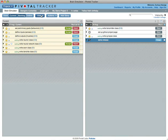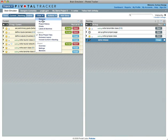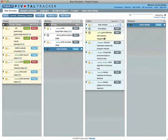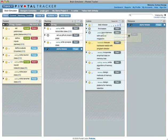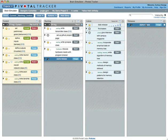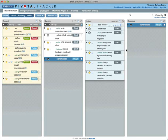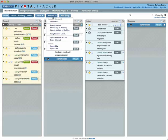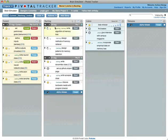Include a story in a release by dragging it onto the Releases pane. It moves directly above the release. Here's an alternative way to prioritize stories. Select them and move to the top or bottom of the backlog from the Actions menu. This allows you to move multiple stories or use interfaces such as the iPhone that don't support dragging.